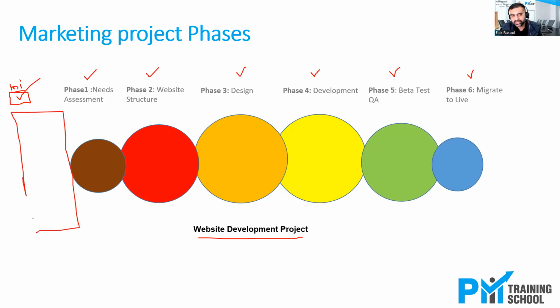In the Waterfall approach, we develop a big plan. This is called planning. In this plan, we think about all these different phases and try to plan for them. Phase 1, phase 2, phase 3, all the way to, for example, phase 6. For each of these phases, we identify what work we need to do. We call them work packages. And for each work package, we identify different activities. That's what we do during the planning stage.